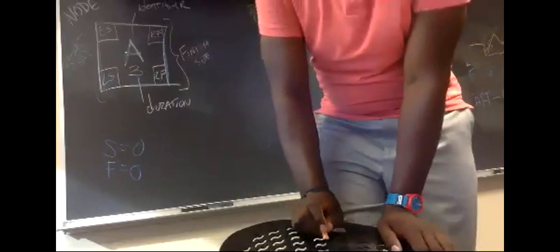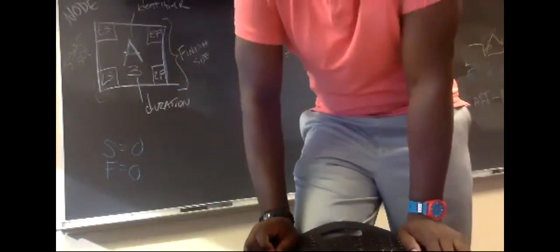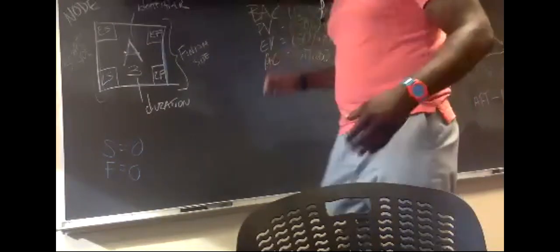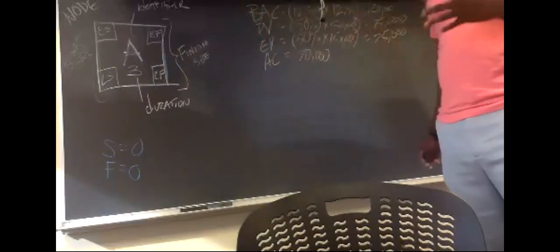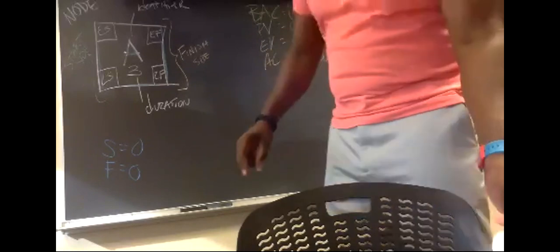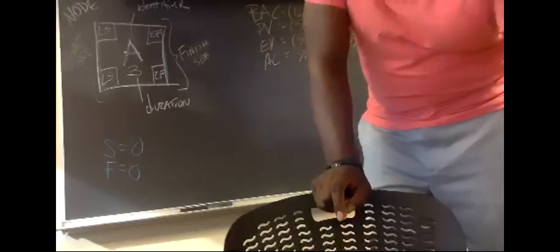Now, actual cost. What is our actual cost? We don't need a formula for this. They told us we spent a certain amount of money. How much have we spent? 70,000. 70K. Very good. Now, with these 4 formulas, we can solve every other formula in earned value. The rest of them come from those 4. That's why I said write them in order, and once you write them in order, then you can tabulate them.